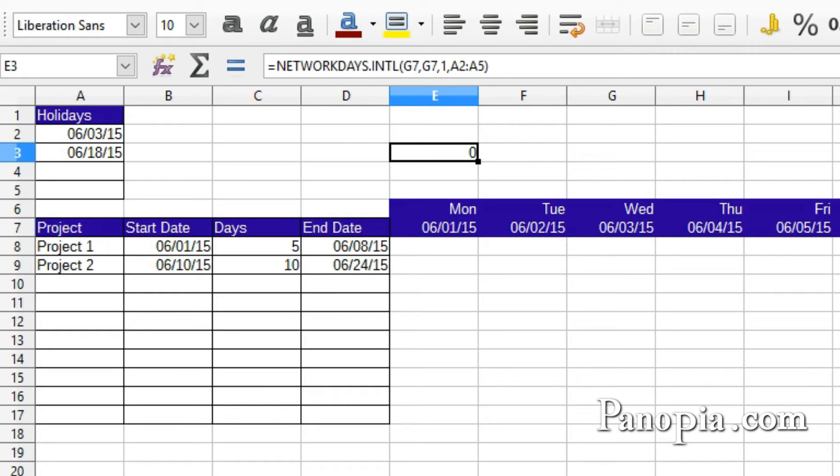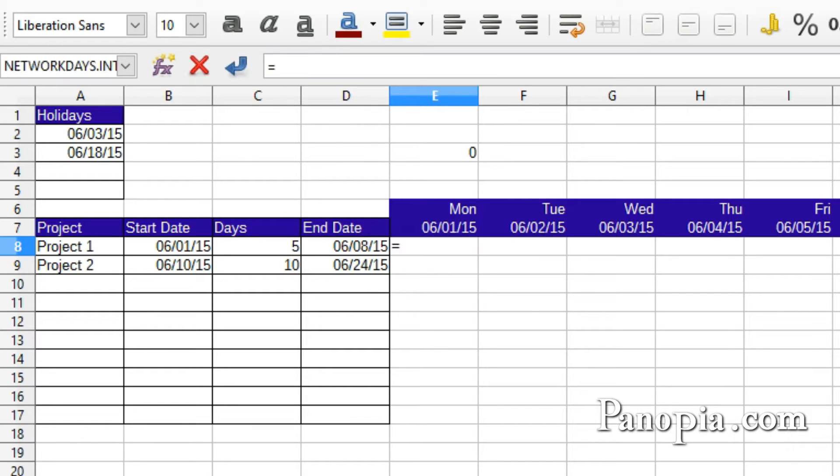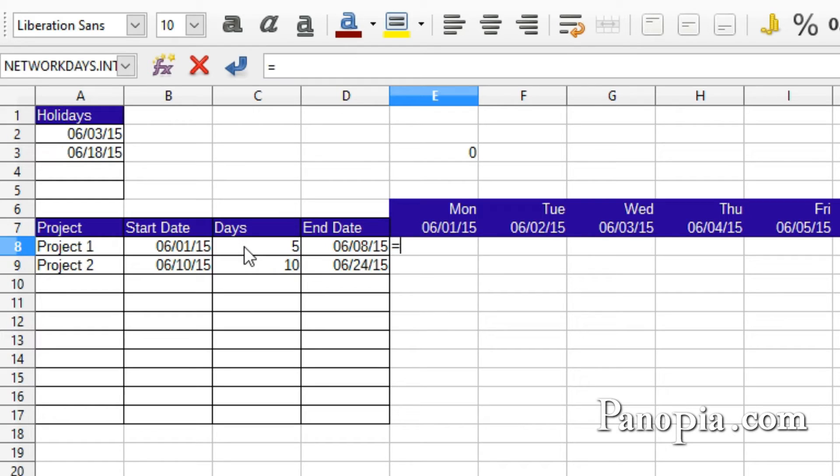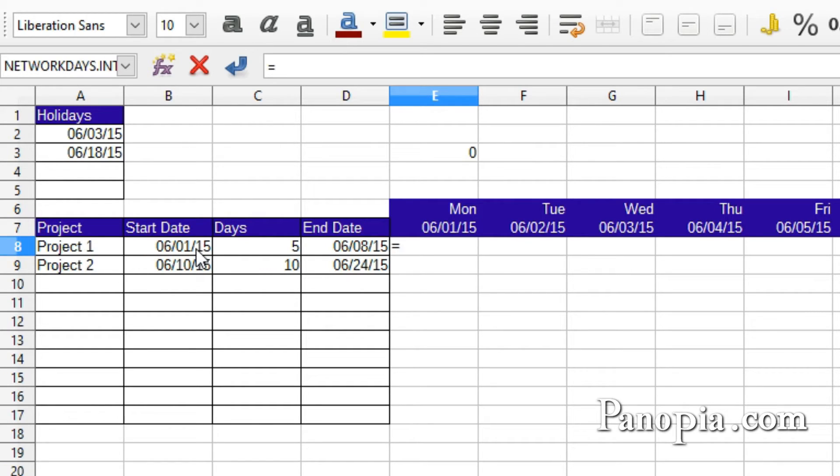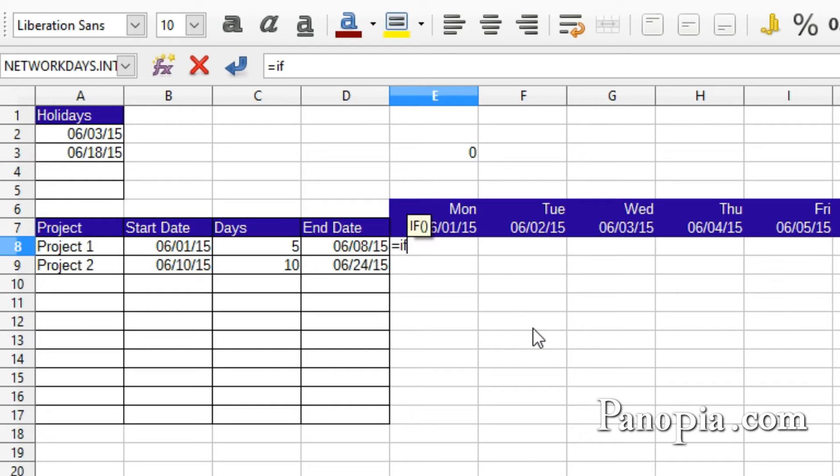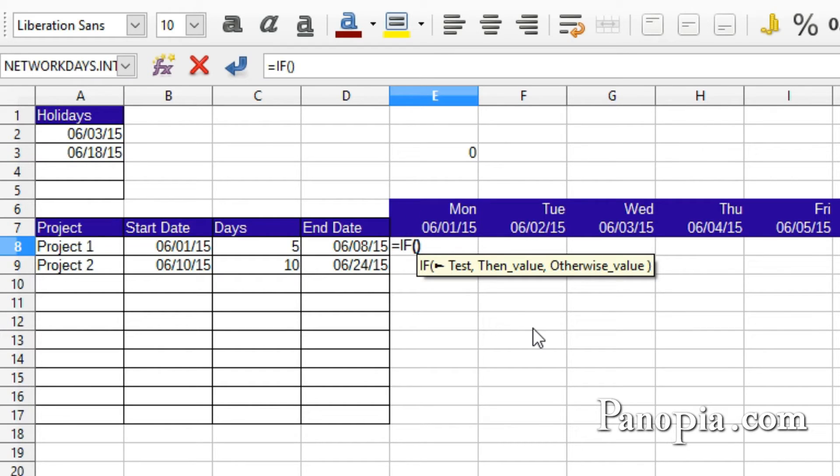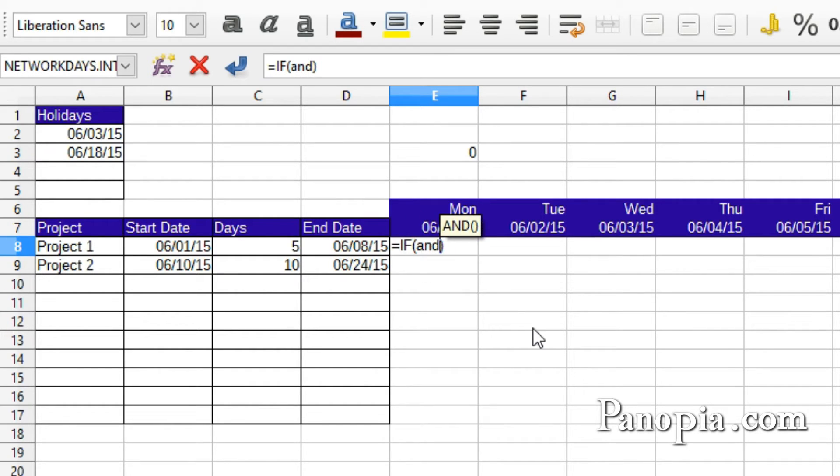Now I can type the formula for the chart. In E8, type equals. First, I'm going to use the IF function with the AND function to test if there's a number in C8, and the date for the cell is more than or equal to the start date in B8, and less than the end date in D8. Type IF, press Enter. Type AND, press Enter.